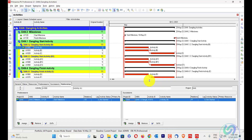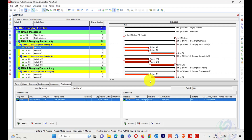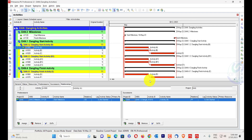There are two types of dangling activities: dangling start activities and dangling finish activities. A dangling start activity is an activity with a start end that is not governed by its predecessor relationship. It could have a relationship with its successor such as start-to-start or start-to-finish, but it still dangles because no activity in the network controls its start.